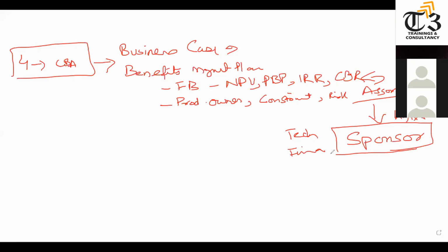If you have multiple sponsors, we can say, I don't care how many you have, give me one person who will talk to the seller, who will be the bridge between the organization and the seller organization. A sponsor will look at it, and then he will do the same thing as in the procurement chapter: they will do the make or buy analysis, whether to do it by ourselves or by outside.